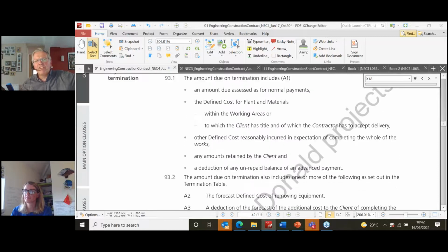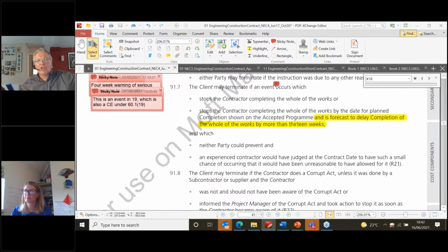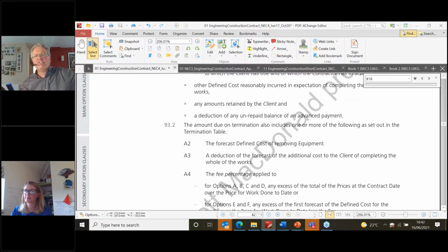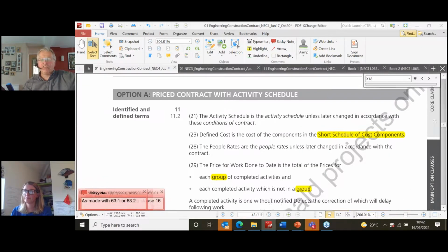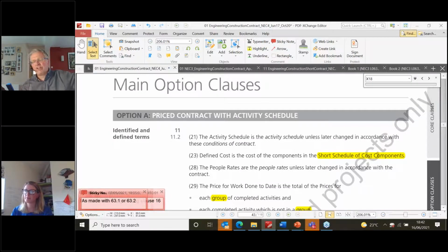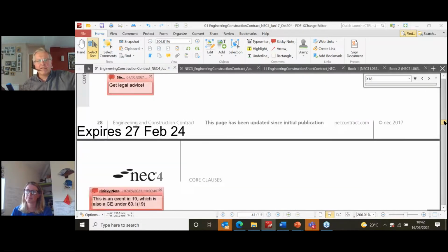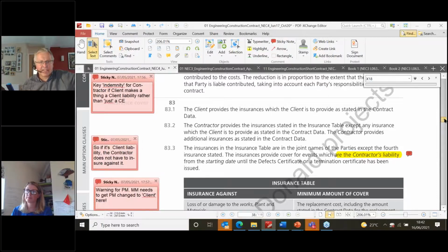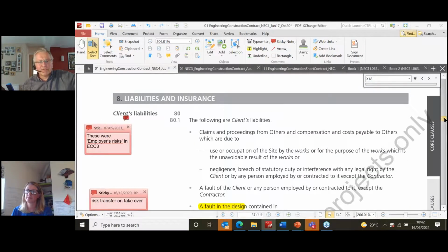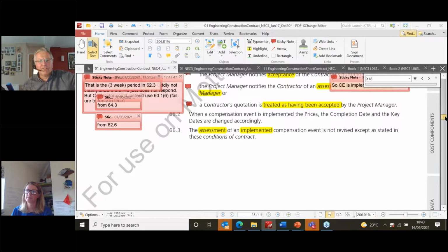So if I'm advising a client today, I will ask the client to consider adding a compensation event, which just says a compensation event is a pandemic identified by the World Health Organization or something like that. Although, of course, if you were signing up a contract today, you'd have to say a pandemic except COVID-19 is identified, because bidders know that COVID-19 is out there. I've been involved with a lot of clients trying to sort out the mess caused by COVID, and it's probably too much detail for today, but as I just said, there is no one simple clear compensation event.